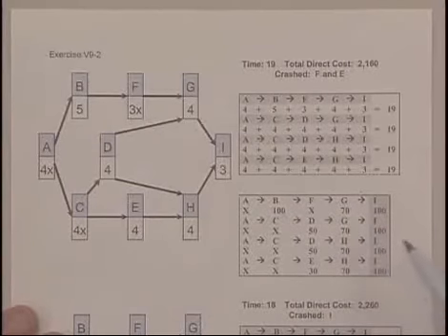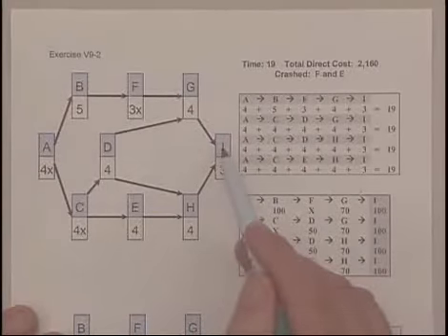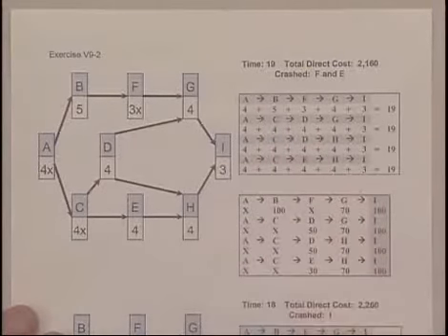We look at the different combinations, and sure enough, even though I is expensive, we are really, in this case, killing 4 birds with one stone. We influence all four paths, and it's cheaper than any combination of the other 3 or 4 activities available. So we'd go ahead and change I to go from 19 to 18.